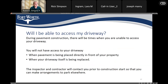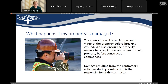A common question is whether you'll have access to your driveway. Unfortunately, there will be times when access is limited — you won't be able to access your driveway when it's being replaced or when pavement in front of your house is being installed. The contractor and inspector will let you know when this is going to happen so you can make other parking arrangements. Prior to construction, the contractor will take a pre-construction video of existing conditions. We also encourage you as a property owner to take pictures and videos of your front yard before construction starts.